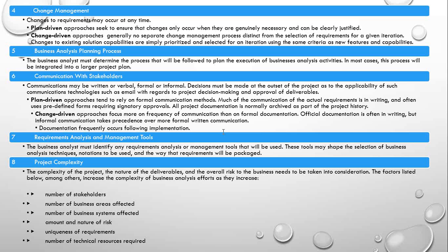requirement, we need to make sure that we are capturing all the requirements, and in agile there is no separate change management process. There is no separate change control board. Whatever you do is based on the outcome of the iteration, the recommendation from the iteration review. Iteration means repetition. If that BRD was reviewed 3 times, that means you had 3 iterations. You will get some requirement changes in the first iteration, another in the second, another in the third. That's how you capture all the changes. There is no separate body sitting to control the changes which are going to happen in the project.